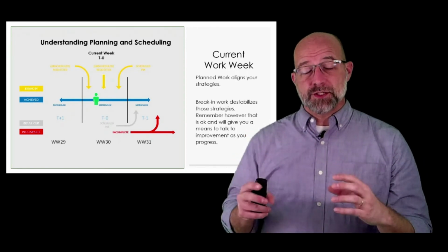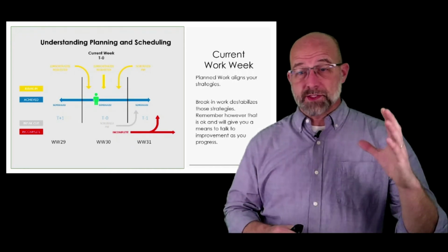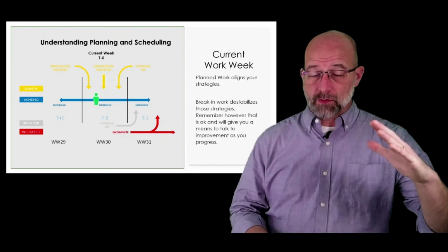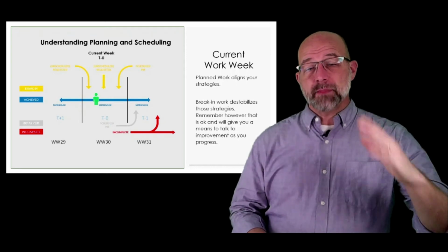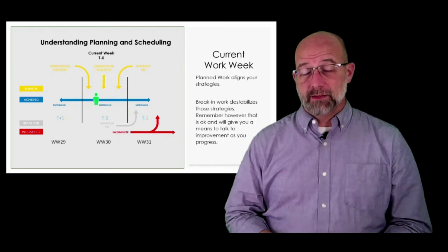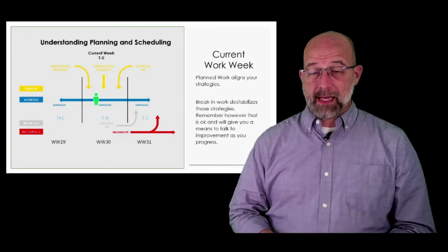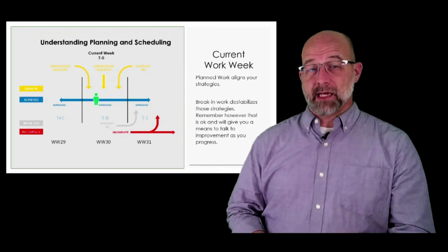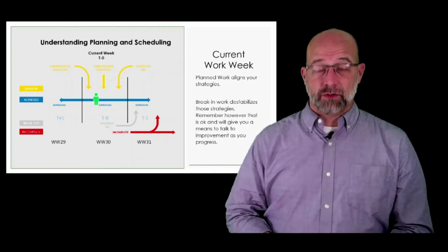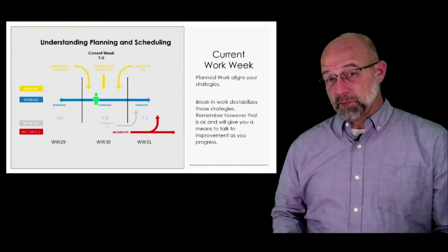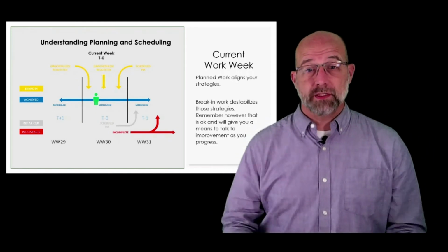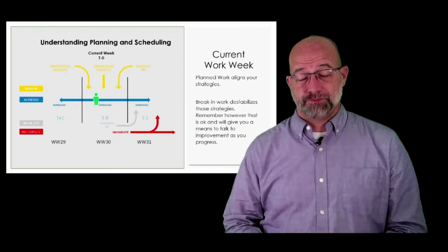If those percentages are off on one side or the other, say you have more break-in work than you do incomplete work, that means that you have a lot of availability in your day, and/or someone is not inputting time and/or planning correctly. So that's a talking point there for your scheduling meetings to align with the holistic strategy of scheduling ahead.